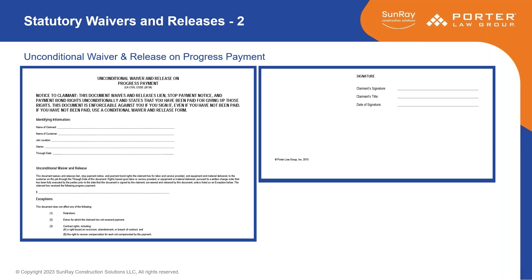Progress payments are those periodic payments on many contracts — usually larger contracts — that happen on a monthly basis or based on achieving certain benchmarks as you proceed. For example, when you have the foundation done you send one, when the walls are up you send one, when the roof is on you send one, or on a monthly basis, whatever the contract requires. Those are the two forms for progress payments.